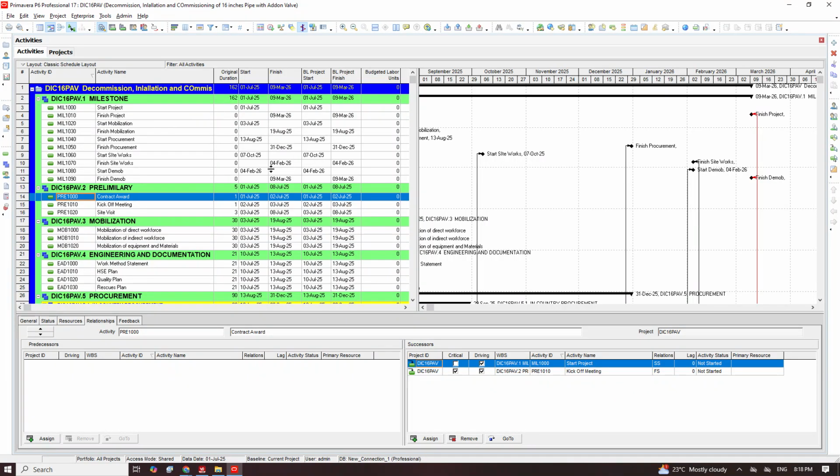and they will ask you, okay, it did not start when it's supposed to start. At your first report, you'll now be asked to push the date forward to the actual time when the project started. It was planned to start on the 1st of July, but now we are starting on the 8th. So we were supposed to start last month, but we are starting this week. So in that case, you will now be asked to push it forward.